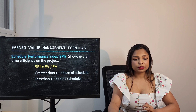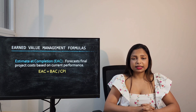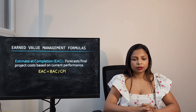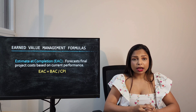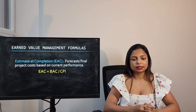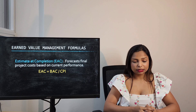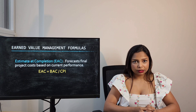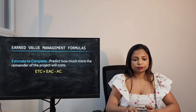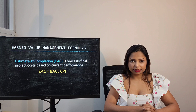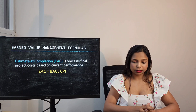Estimate at Completion, or EAC, forecasts the final project cost based on current performance. The standard formula to calculate EAC is Budget at Completion divided by Cost Performance Index. There are other formulas as well, but this is the standard one.